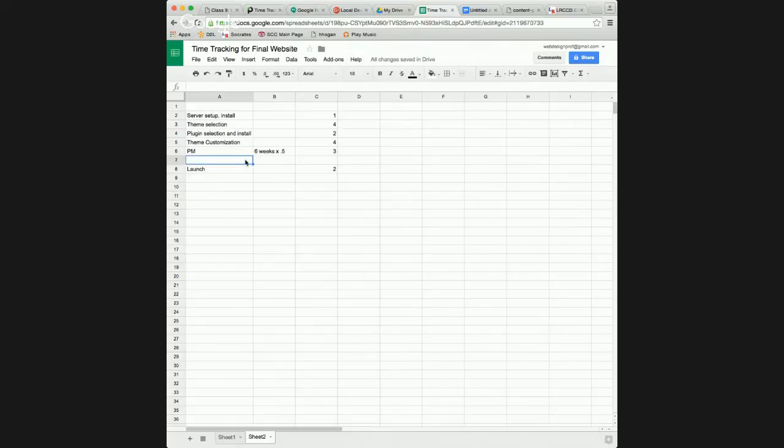So you're going to have your theme, you're going to have your content migration and formatting. Depending on how much content that is, this totally depends on how many pages. If it's a 5-page website with 10 images, probably looking at 2 hours. If it's a city website with 500 pages and 600 images, you're looking at a lot larger number, right?